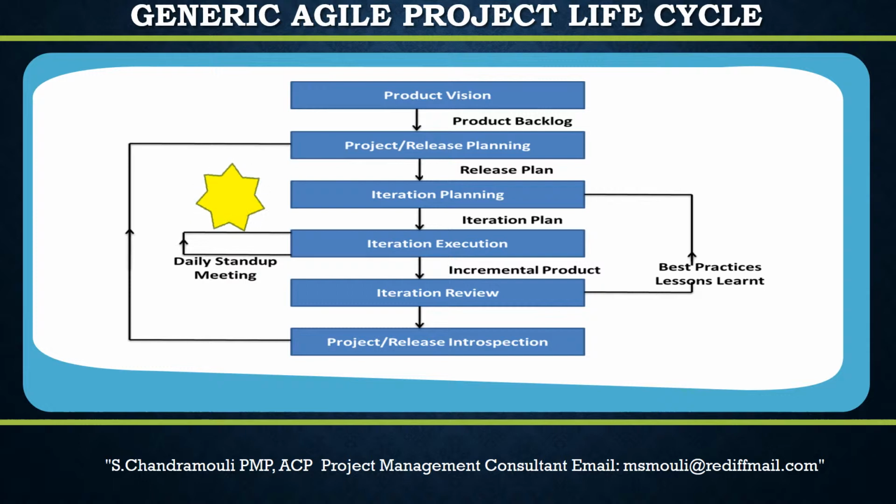A typical release happens in 2 to 4 months of time. Release plan is defined by the product owner. The delivery team and the product owner need to agree on the number of iterative cycles, sprints, in each release. Release planning meeting happens for 1 full day.